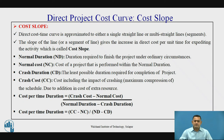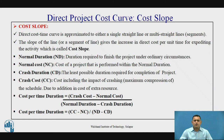The cost slope is a concept which helps us to determine the extra cost to a particular activity per unit duration if we go for the compression of that activity. The direct cost-time curve is approximately a straight line or multi-straight line segments. The cost slope is the particular cost associated with the activity per unit duration. The first term required is normal duration — the duration required to finish the activity under normal or ordinary conditions.